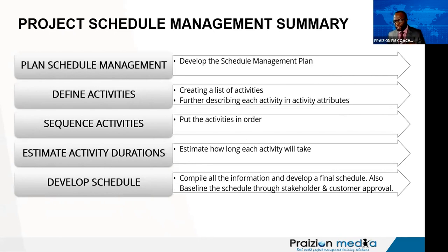So when it comes to develop schedule, there is some minutia that you need to pay attention to as you study. And those big ticket items, the first 4, let's cover this one as well. Project calendars. So project calendars, it says here on page 220, it identifies working days and shifts that are available for schedule activities. It distinguishes time periods in days or parts of days that are available to complete schedule activities. Basically, it shows you working time and non-working time within which you can complete the project. That's the summary. So these ones that I've mentioned here, folks, very important. Schedule baseline, project schedule, schedule data, project calendars. You got to know them well.